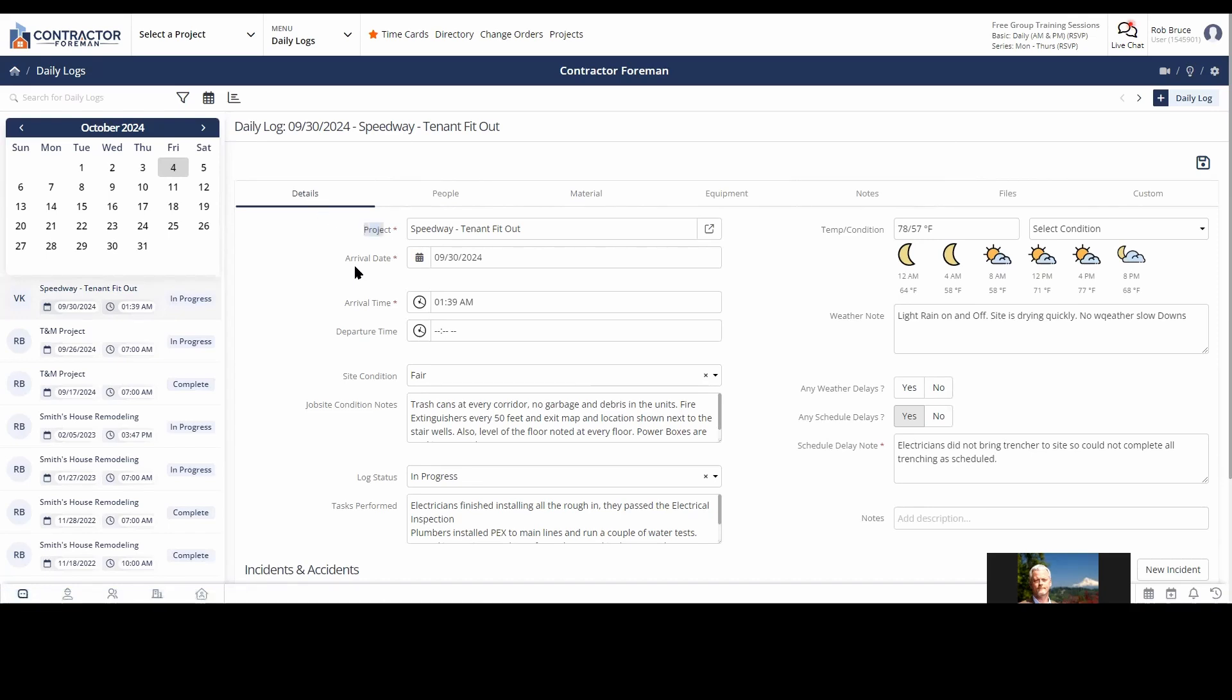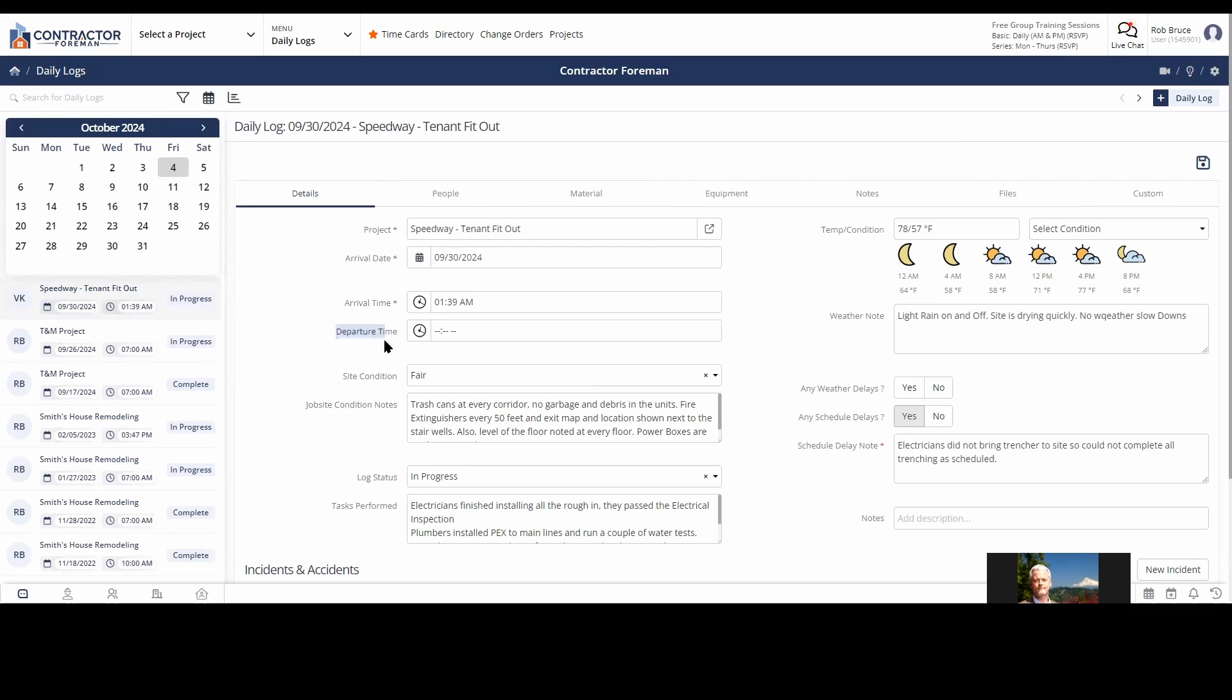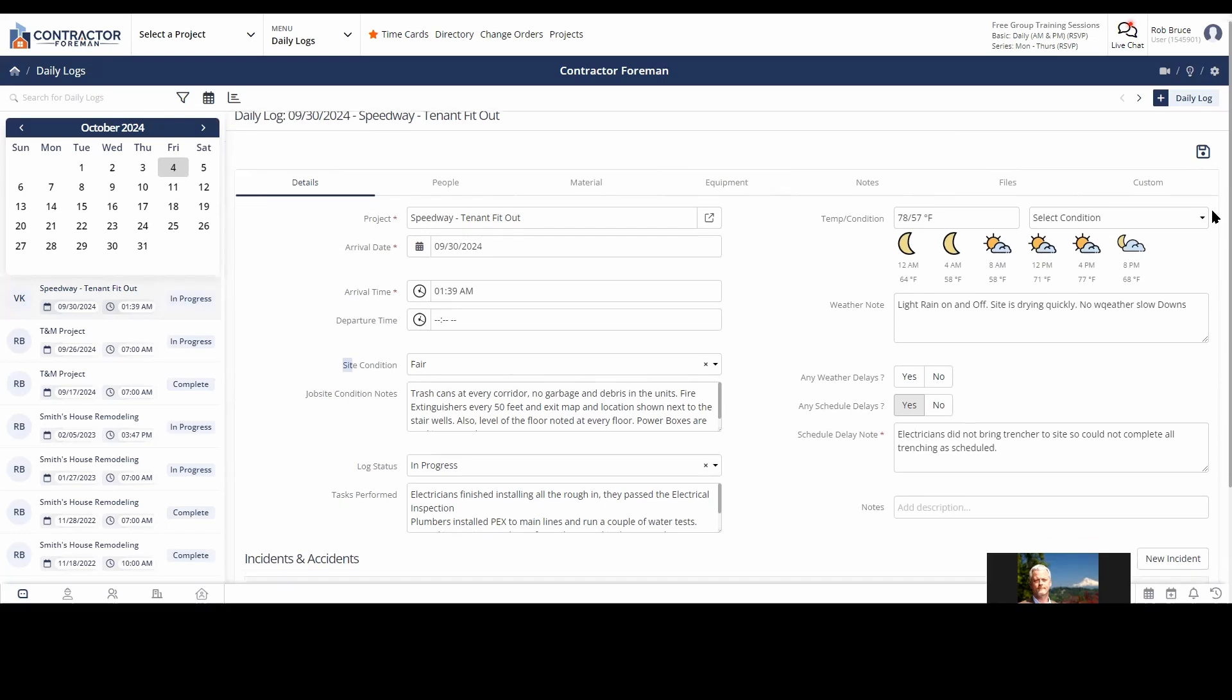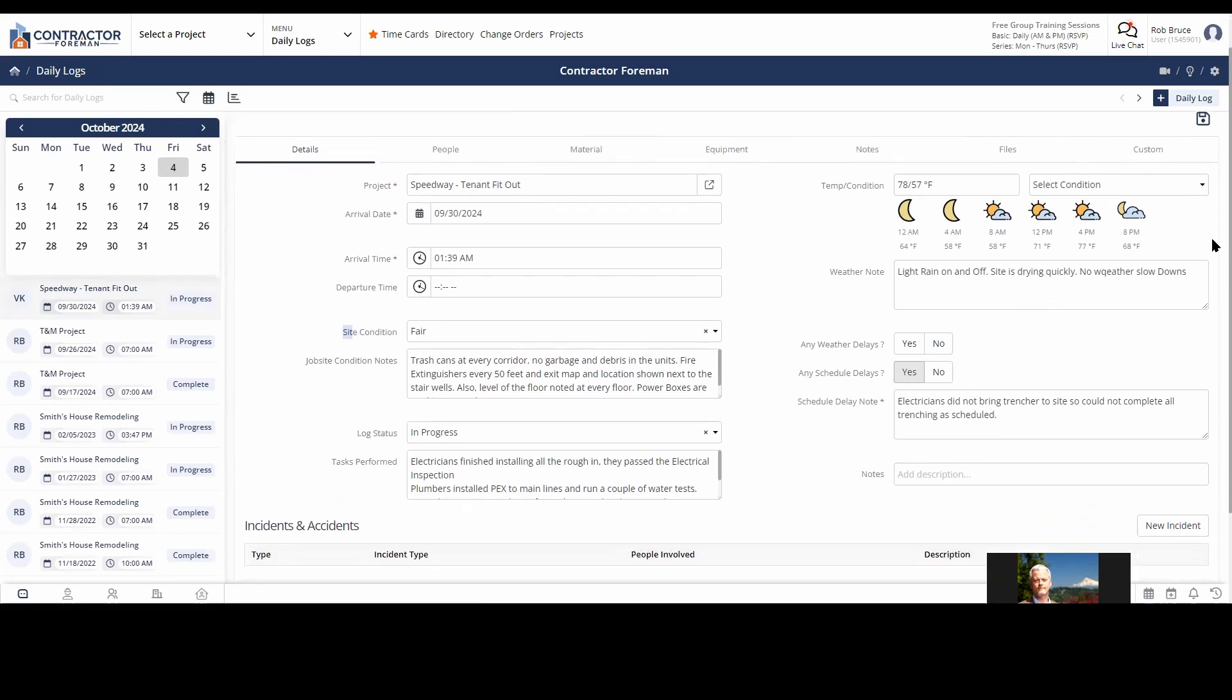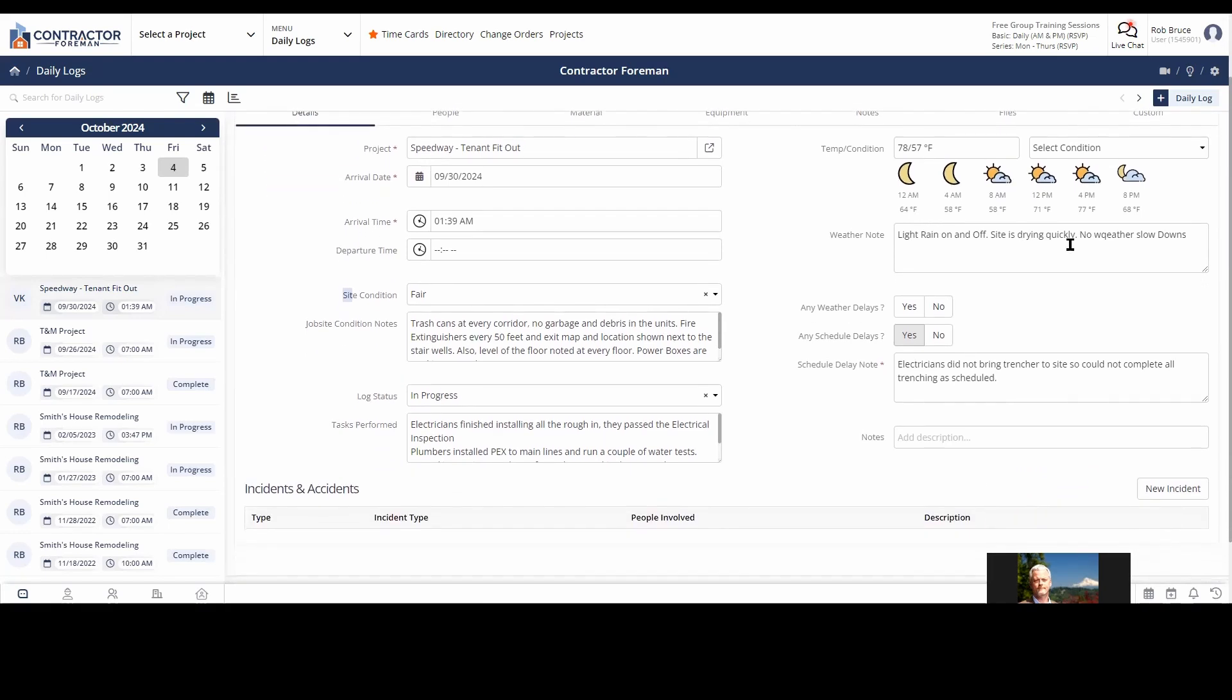And you can see the tabs across the top. We're going to start off in Details. Details and Details is just kind of that. So project, arrival date. This has nothing to do with time cards. We're going to get into how time cards feed into Contractor Foreman and daily logs here in a minute. But this is just, you know, what's the date of the daily log? When did everybody basically show up? When did everybody leave? Site conditions, condition notes. So you can see all the standard fields that we have here. It's going to automatically pull in the weather based on zip code, address. Got weather notes and things like weather delays.